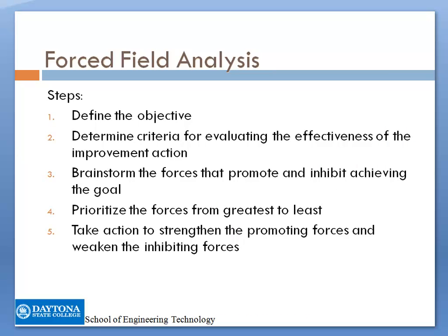So what steps do we use to build it? With the procedure, first you define the objective, then you determine the criteria for evaluating the effectiveness of the improvement action. Then you brainstorm the forces that promote and inhibit achieving the goal. Then you prioritize the forces from greatest to least, and then you take actions to strengthen the promoting forces and